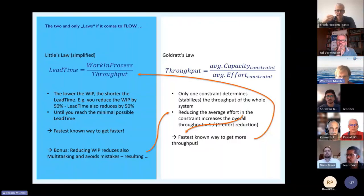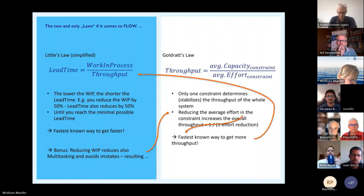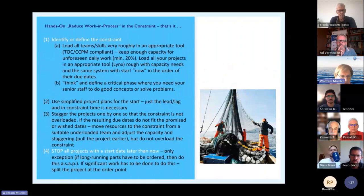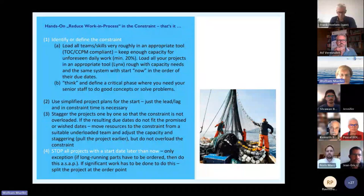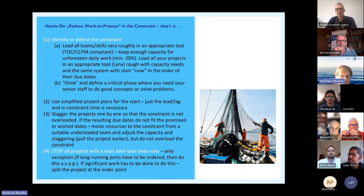The most interesting part is: if you reduce work in progress, typically multitasking goes down, mistakes go down, and the average effort is reduced a little — and this already counts into the throughput, so lead time goes down again. That's everything you have to know. If you are now a manager, the most important thing to do is to reduce work in progress.